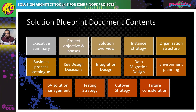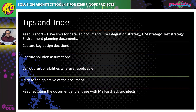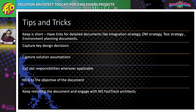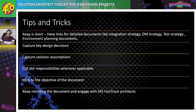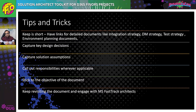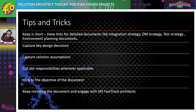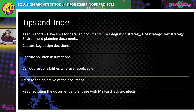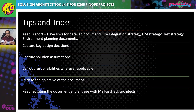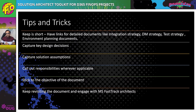Integration design and data migration design are also key components we will cover in upcoming slides. A few tips for a good solution blueprint: keep it short, don't elaborate in excessive detail on everything — have separate documents for things like testing strategy. Capture your key design decisions and solution assumptions, because if these change the solution is impacted. Stick to the objective of the document — it's not a statement of work or a detailed architecture document. Keep revisiting it and engage with your Microsoft FastTrack architects, as Microsoft conducts a solution blueprint review exercise as part of Success by Design.